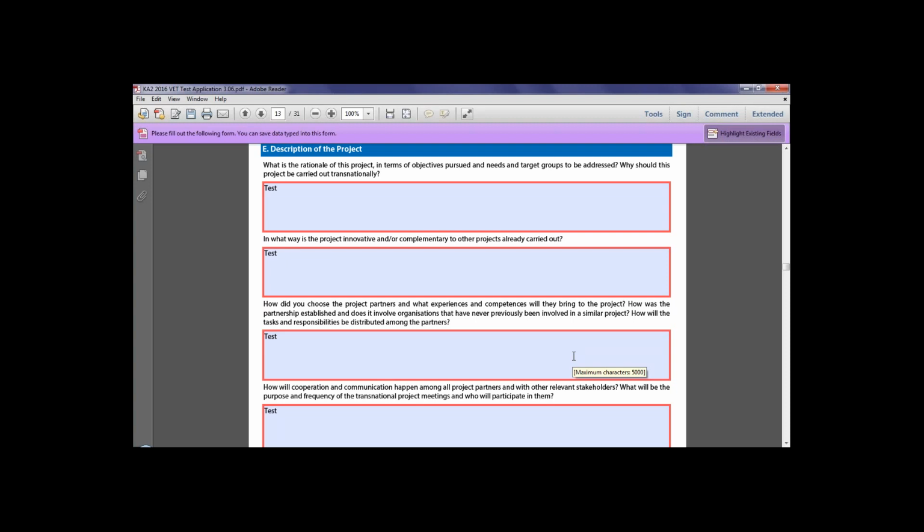Make sure that the number of partner meetings is appropriate, as assessors consider that hosting more than one partner meeting could be excessive unless well justified. Show that the planned participants are appropriate to the project activities, as this will support your request for budget under transnational project meetings heading. Make sure your results fit with the objectives of the project and that they are realistic and achievable. You should also provide details of which partners will be involved in producing each result and when they will become available. Make sure you know what is meant by results.